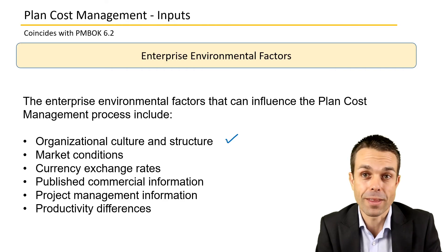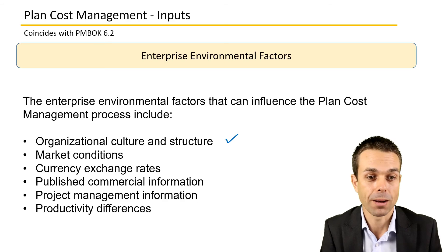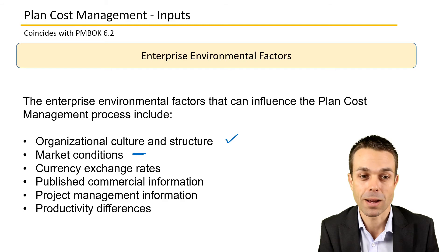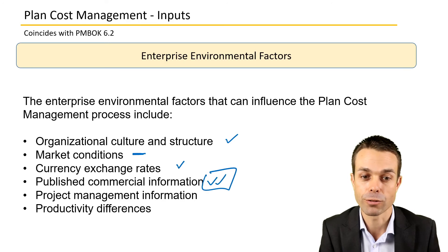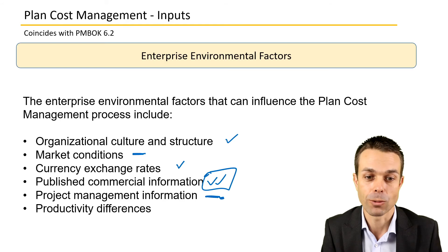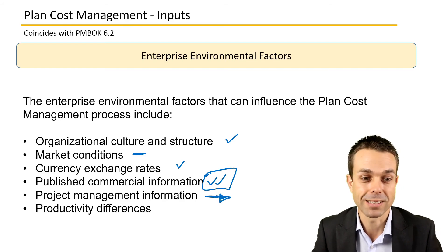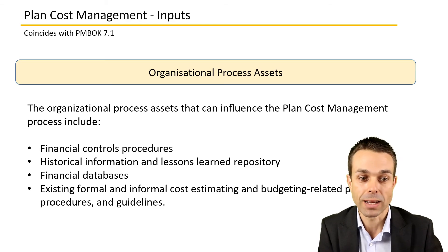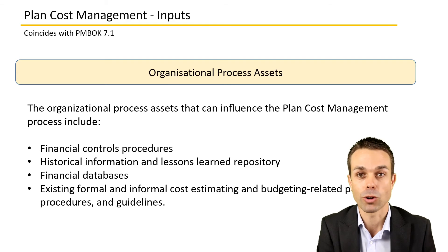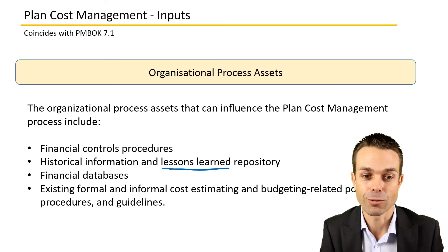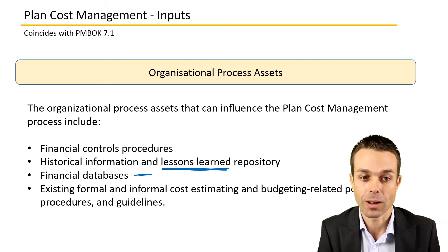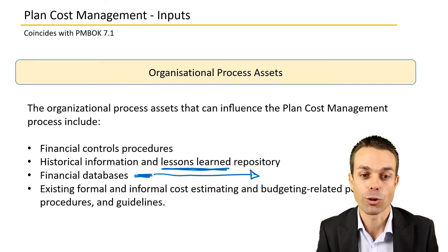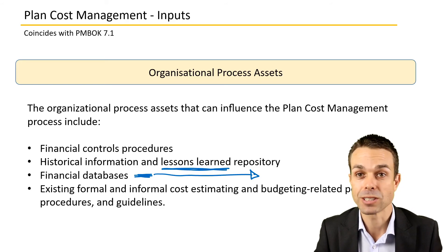Enterprise environmental factors include organizational culture and structure — how is work done, are there certain formal processes to follow? Market conditions that might impact cost management, currency exchange rates, and published commercial information like cost databases are also relevant. Organizational process assets include financial controls procedures, historical information and lessons learned from other projects, financial databases, and existing formal and informal cost estimating and budgeting-related policies, procedures, or guidelines.